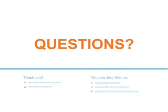Sure. So the first part of that is the workflow validation. So we had a group of champions from the ER come into our lab and validate the workflow first. So anything that came up that would affect that, we could make those changes before we deployed it. And that was critical because we kind of knew what we were getting into and what issues would come up when we implemented and when we went live. From a training perspective, we did it in two ways, almost like we did our Epic implementation. So we had training materials, made those available. We put that training material online so the clinicians could access it. Of course, we handed out that training material as pocket guides. And then what we really felt was important is to do at the elbow training.